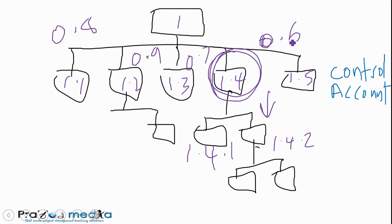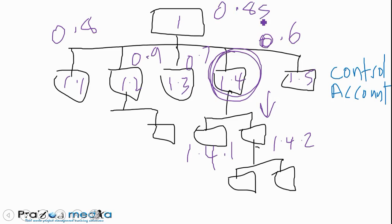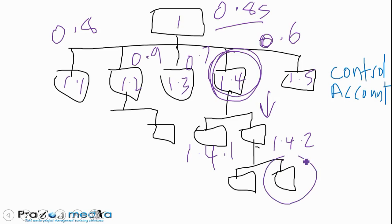Perhaps 1.4 is performing badly at 0.6. This enables management to very rapidly track the performance of each of these control accounts and zero in on where the project is not performing well. Perhaps at the topmost level, the overall cost performance index of the project is 0.85. Having your control accounts broken out like this enables management to zero in on where the problem is. Perhaps a major problem of that 0.6 comes from 1.4.2.1, for example.